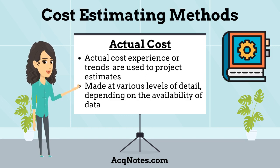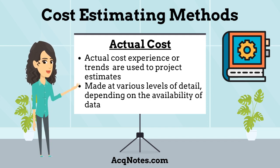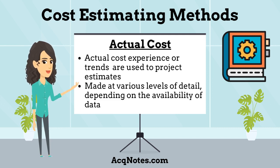The fourth estimating method is the actual cost estimating method. With this method, actual cost experience or trends from prototypes, engineering development models, and/or early production items are used to project estimates of future costs for the same system. These projections may be made at various levels of detail, depending on the availability of data. Cost estimates that support a full rate production milestone decision should be based on actual cost data to the greatest extent possible.